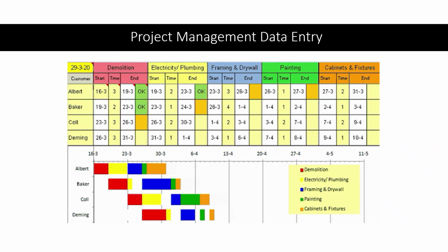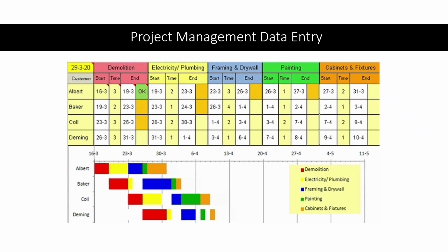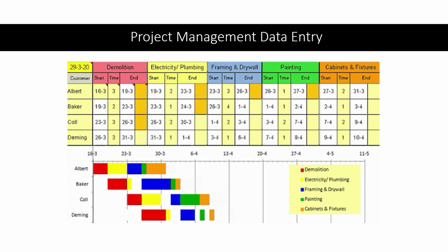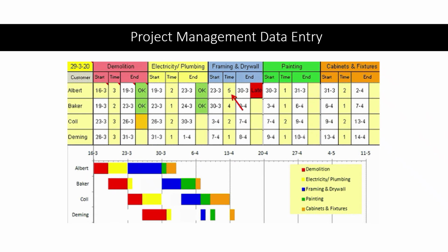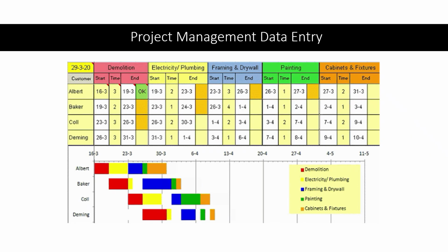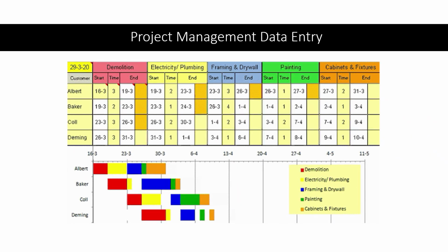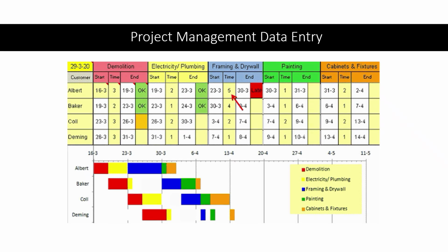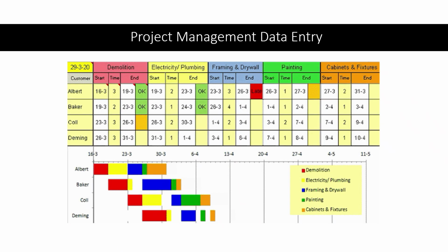In complex projects, where multiple people and organizations are involved, it is essential to keep everyone up to date in real time. Since jobs are interdependent, any delay can affect several jobs downstream. They all need to know when the preceding jobs are completed to plan their own. Access to the updated schedule anytime, from anywhere, is easy if the project schedule is in the cloud and accessible by all participants with their smartphones.